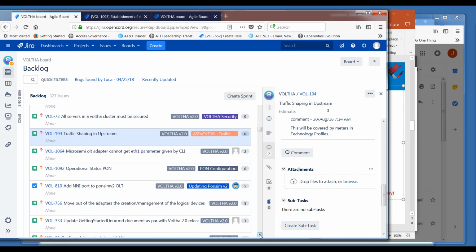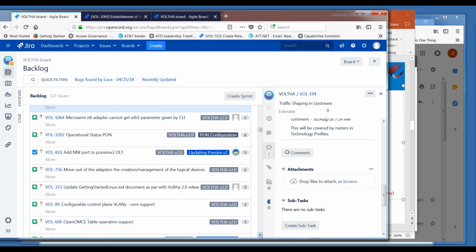All right. And then I think this brings us down into the meeting priorities. So I think with that, probably if no one has specific items they are thinking need to be pulled into Sprint 7 at this point, we'll see what we have for scope after Sprint 6 closes out at the end of this week. And then on Tuesday's call, we can do some additional assessment as needed and see what we have available for resources for work as well.